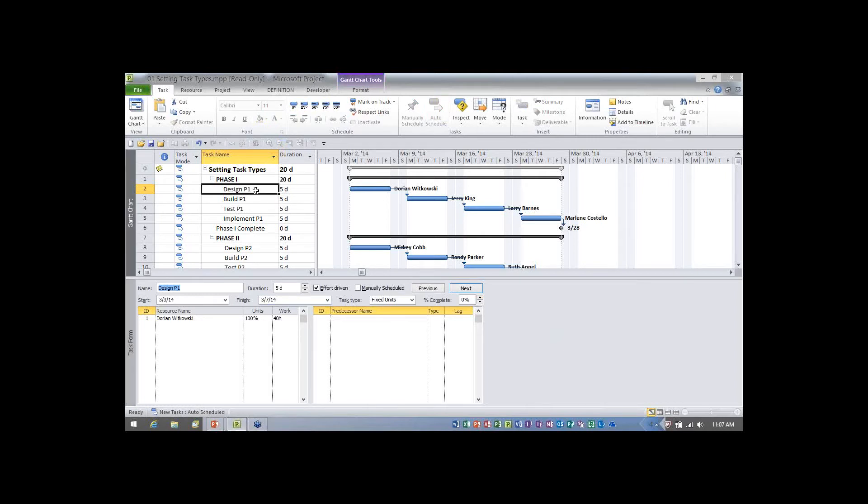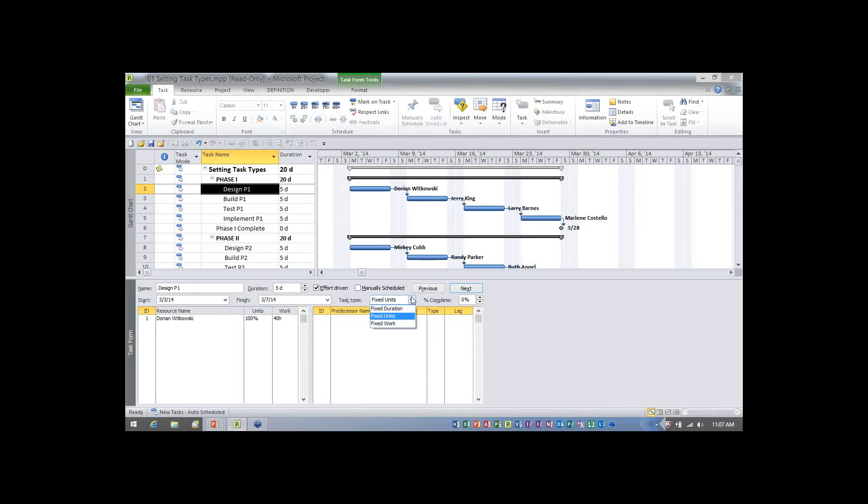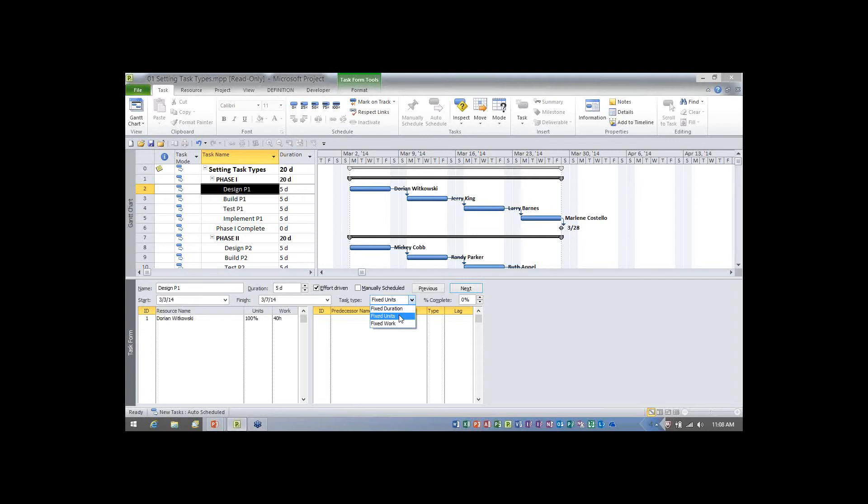Now on the first task, design P1, I want you all to look in the bottom pane with me. See the task type value and you have a pick list here. If we click the pick list, we'll see the one that's selected already is fixed units. And by the way, that is the default task type when you install Microsoft project initially on your computer. The default task type initially in Microsoft project is fixed units. You can also see we have the choices to do fixed work or fixed duration.